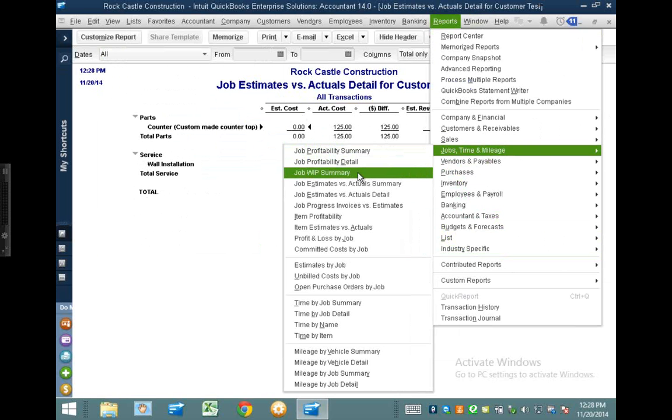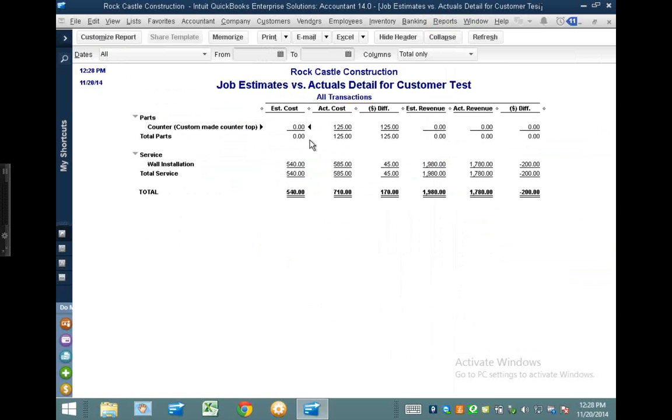We've got some about what happens if you uncheck the bill to customer box when it's still tracking the job, but not billable. Great question. What this is measuring is what is hitting your expense account or your cost of goods sold account. This is not measuring whether or not you're marking it billable. If you mark it billable, all it means is it's going to remind you to make sure you charge the client for it. If you uncheck it, it just doesn't remind you to invoice it. It does not affect job cost. Good point. It's going to show up as an expense whether it's billable or not allocated to the customer.